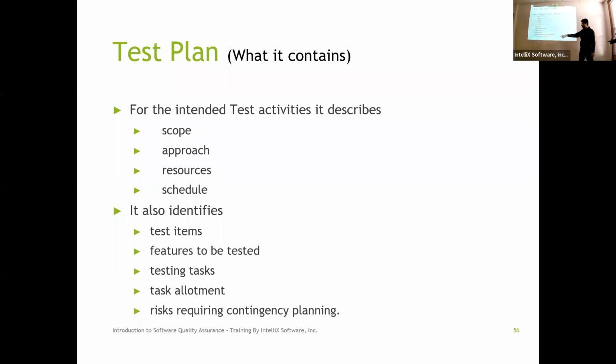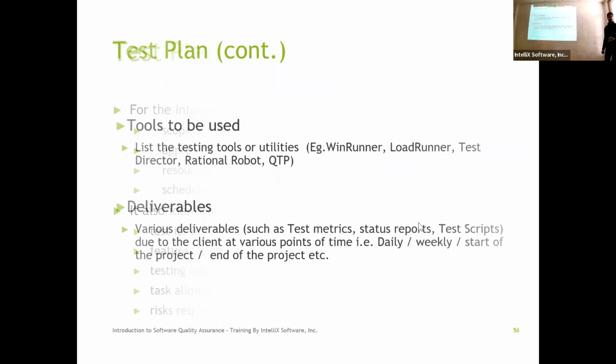Or the other alternate option, you could say, instead of 5 people that I was anticipating to do the testing, we need to add 15 people in order for us to meet that timeline. Is it possible? I don't know, right? Depending on the risk, the dependency on the projects, and the work, you can possibly do that. Or the third option is, you know what, we need to shift the timeline, add 2 weeks and tell the customer, you're not going to get this date, it's going to take 2 more weeks. So you can identify all the risks and say, hey, what are the potential options that we need to think about as we go through it?